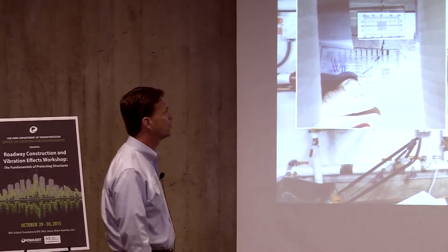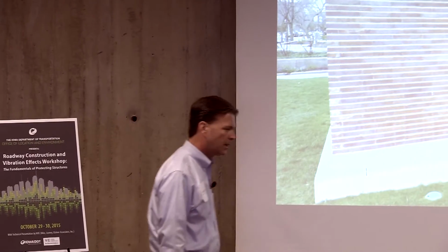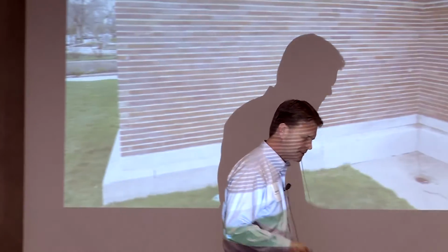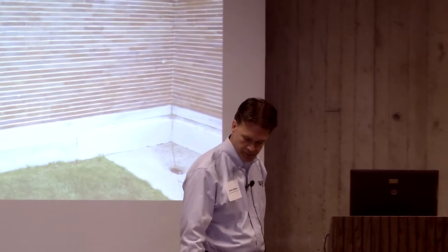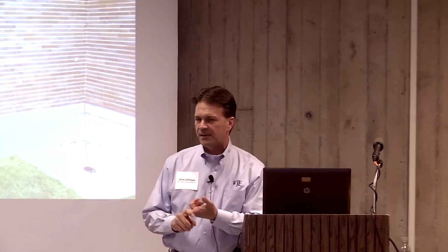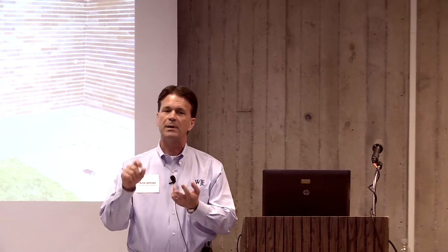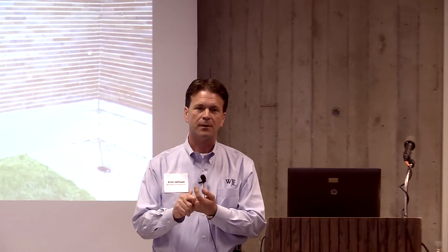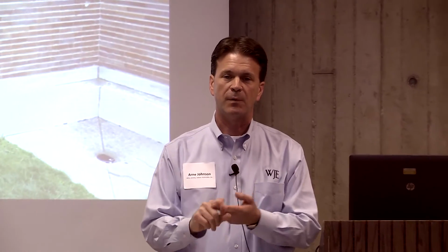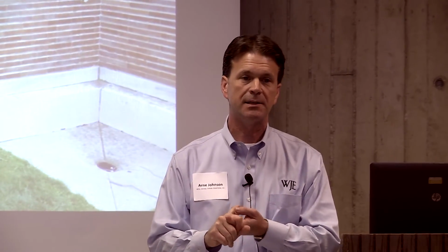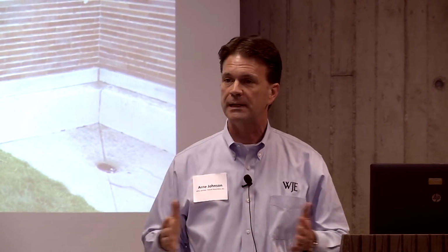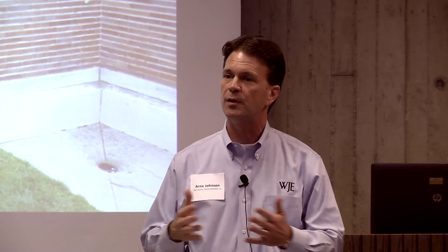So we knew that the growth was real. What we were able to do in this case, and this is my last slide, and I'll take a question or two after this, but we had vibration data, and we had survey, careful documentation. The vibration measurements did not exceed the 0.2 limit. We reviewed it again. We scrutinized the data. We didn't go over the 0.2.